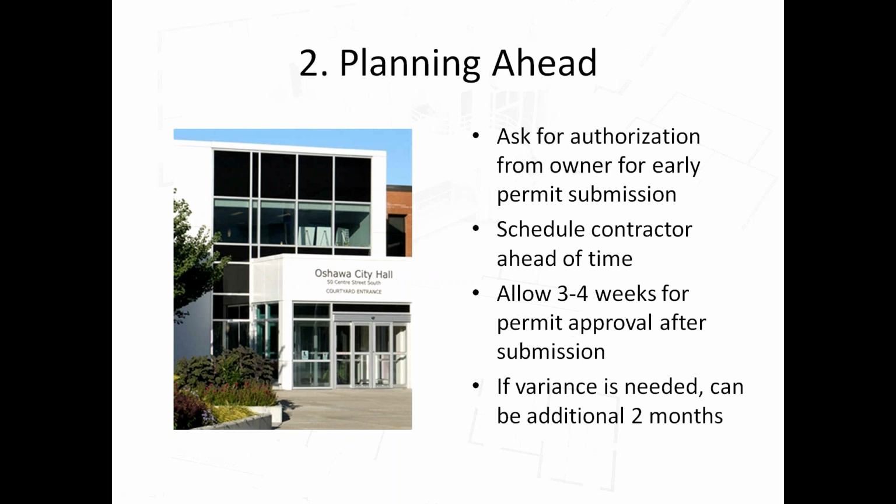Now, having said that, I have on many occasions submitted the permit application before the property closed. I think the official rule with most of them is that it has to close first, but sometimes they've said that's fine, we'll put it in the queue, we'll start looking at it, and before we issue the permit, we need to get some proof, like title on the property, or if it's closing sometime down the road, then they may ask that you get an authorization form from the current owner. Okay, but if you can, try to submit it as early as possible, and then also schedule your contractor ahead of time if you can.